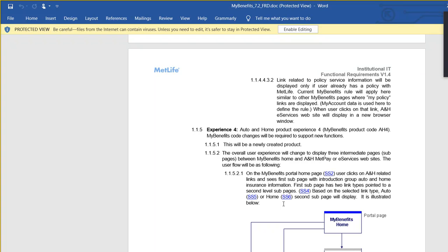Okay, so when you plan a testing in a test plan, right? If you do not know the scope, if you do not know the requirement in details, then you cannot schedule it. You might be scheduling something for 15 days, but it might take 3 months. So when you make a plan, you have to know how much time it will take to test, right?